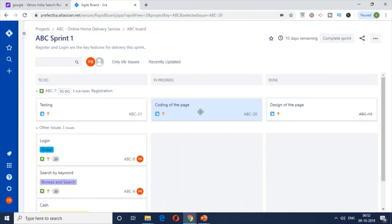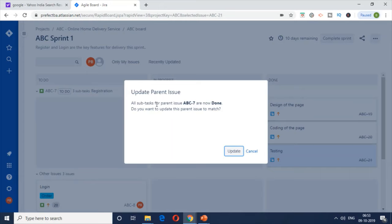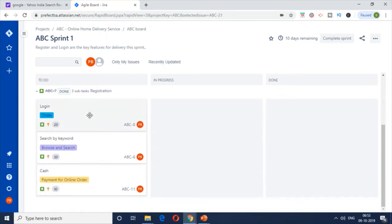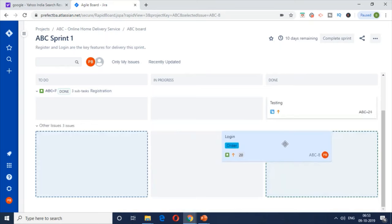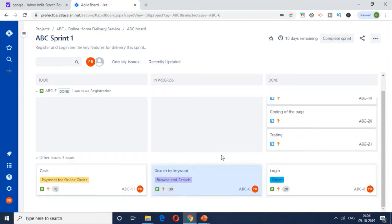This board gives a real-time view of what is happening in the sprint. The second agile ceremony is the daily scrum. Ideally, the scrum board is displayed and all team members join a stand-up — or a call if distributed — and discuss what they did yesterday, what they're going to do today, and any blockers. This board gives a clear picture of who is doing what. Once all subtasks for a story are moved to Done, a pop-up appears asking to update the parent story to Done as well.